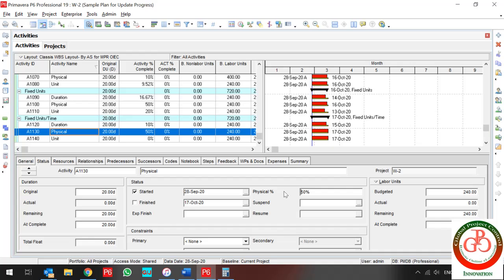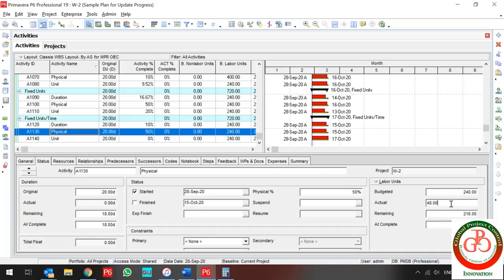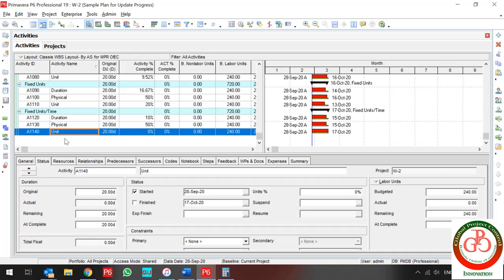For Physical with Unit Per Time duration type, this field is up to you — you can update it yourself. Physical percent complete is only a guideline. If I enter 48 for actual, my remaining and my labor unit are connected to each other. But if I change the remaining duration to 80, my actual unit is fixed because it's related to my work, and my remaining and at-complete update.